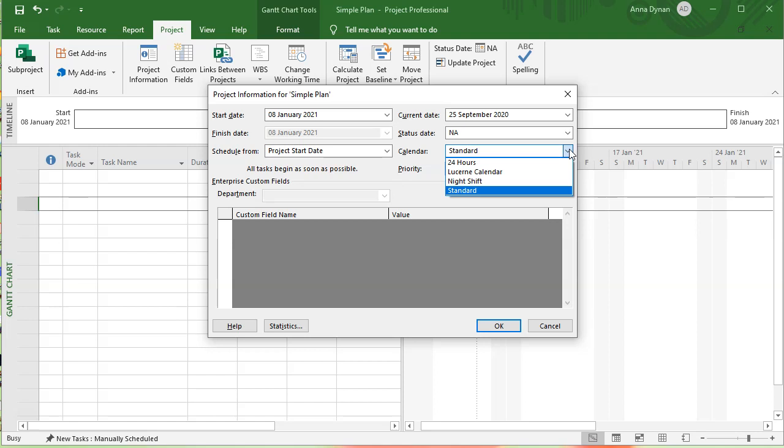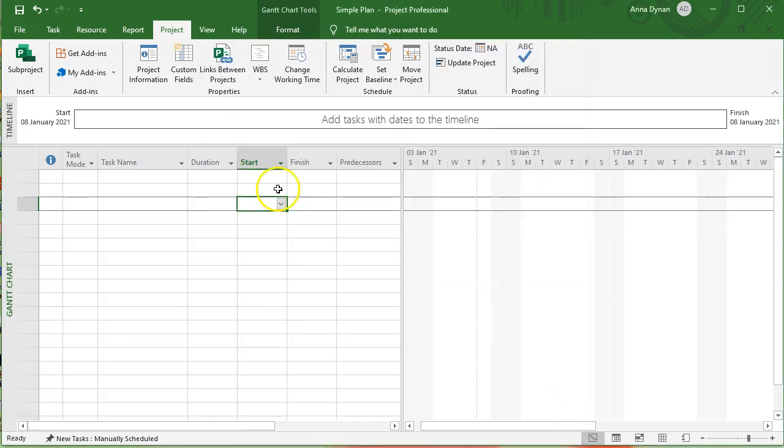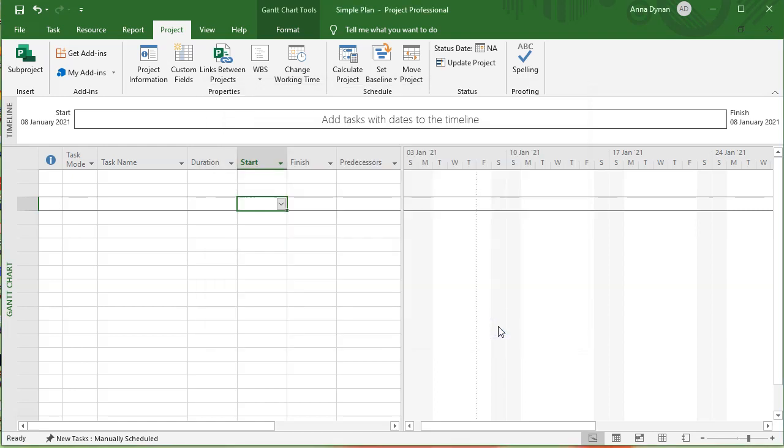So one of the questions would be, create a new calendar called blah, blah, and enter the following details in the calendar. So I will check, have you created the calendar? To check that, I will go into your project information and check, has he or she created this calendar? Have they put the events into the calendar? Yes, they have. Next question, associate the calendar with the project. So you would have to go into project information and make sure you select that calendar. So that is the calendar that's now associated with the project. Okay, so now we are ready to start putting tasks into the calendar.